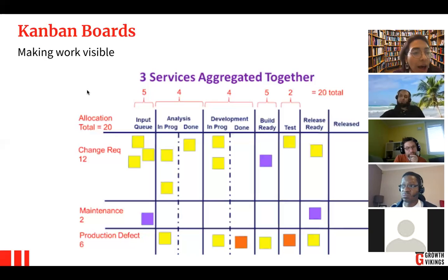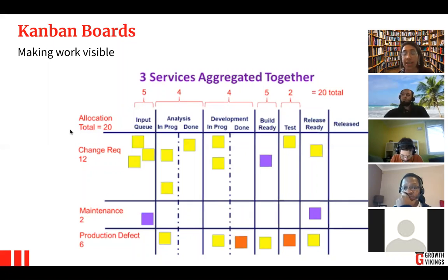Okay. Then I had another question there. How do you do dot voting on the cards? Okay, so you mean which are the key cards that are going to be selected? You have a planning moment in which the team comes together and overviews what's going to be the work ahead. It is not a norm how long that planning takes place. It doesn't have to last 8 hours. It's up to the team to decide how long it lasts. So different from Scrum, it doesn't tell you necessarily the amount of time. Each team decides whatever timing of planning they want.